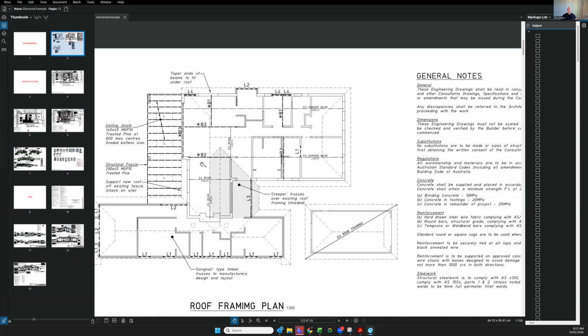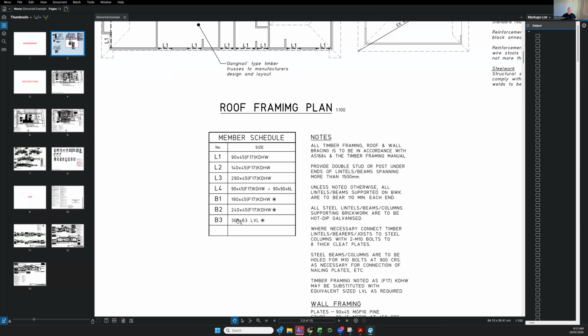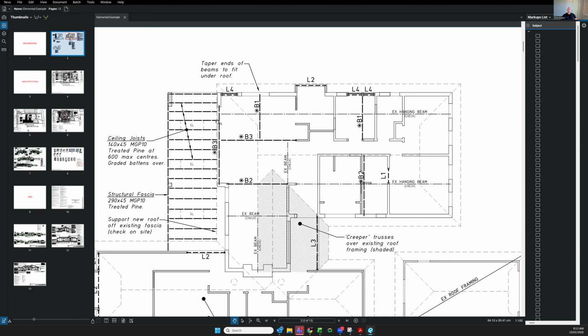Because what we also got to remember that we also forget is when we order it, sometimes we don't pay the exact linear meters on the plan. So very important to have an understanding that we always want to be over. For example, if we're doing this B3 beam, which as per our takeoff is another 363, if I put that beam into there, it's definitely going to be short. So I'd be comfortable to say that's 7 meters. I would even be happy to go to 8 meters to make sure I'm covered.